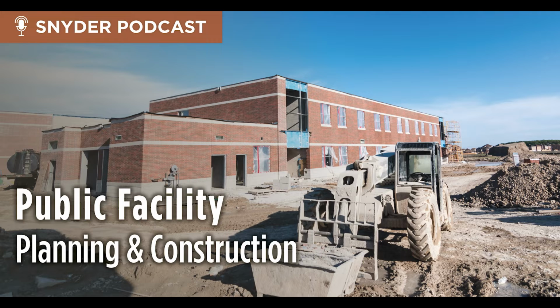One thing that has come up in the past for me was I'd like to ask the client or the owner what maybe was in this area previously, maybe some historical information. The geotechnical definitely helps, but one time we actually found a footing from an old building that was there before that they just ended up burying on site. Of course, we didn't have soil borings every 5 feet, but those contingencies that you were just talking about come into play at that time. And if we know that going in, we can accommodate that and work around it. If it's a surprise in construction, it can really cost a lot of money and equally important time, and that can be a big delay for the construction project.